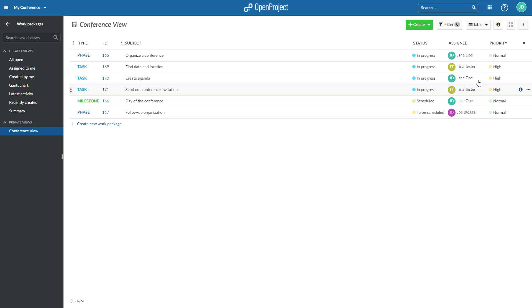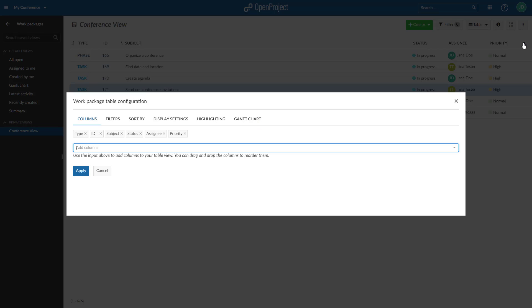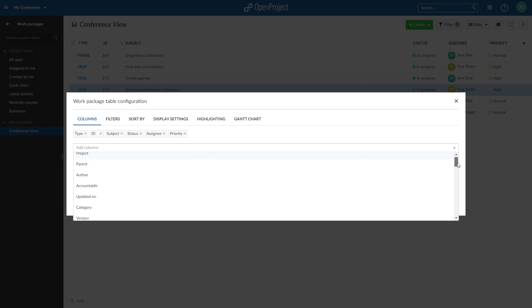To add relation columns, open the columns modal and select a relation from the drop-down menu. For example, Includes Relations.